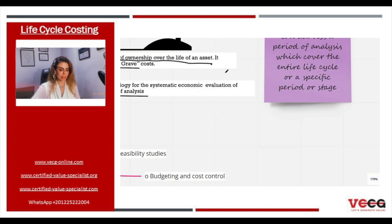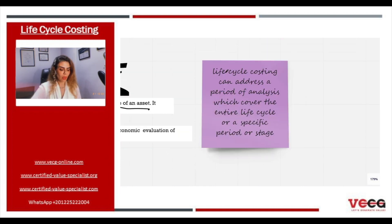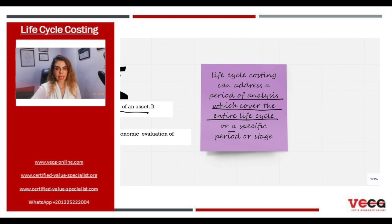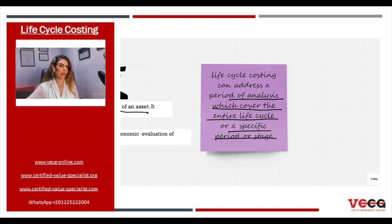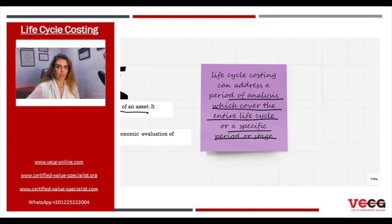Life cycle costing can address a period of analysis which covers the entire life cycle or a specific period or stage. We can calculate the life cycle costing of an alternative during a specific duration — the first 10 years, the first 20 years, and so on — or during the entire life cycle of a project if it was designed to serve the community for 50 years. That duration represents the life cycle.